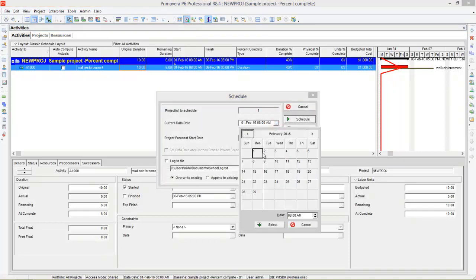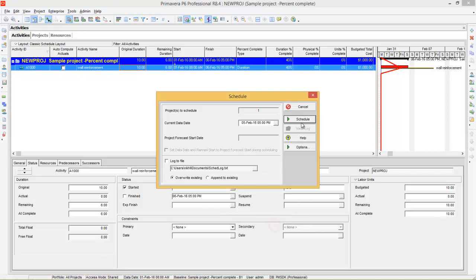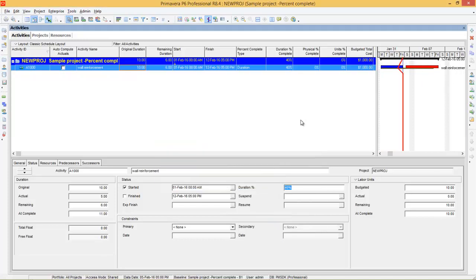That means day 1, 2, 3, 4, 5th day, 5 PM — press Select, then Schedule. Now you can see there is a delay in this project because at this point 50% of the project should be complete, but you have completed only 40%. Now look at labor units.